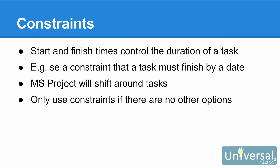You already know that task start and finish times control the duration of a task and determine its timing. A constraint comes into play when the project starts to run late. For example, when you set a constraint that a task must finish by a certain date, Microsoft Project will shift around almost any other task in the schedule to recalculate timing. Putting a constraint on a task means that everything else scheduled for your project might be shifted to meet that constraint. Because of this, you should only use constraints if there's no other option.